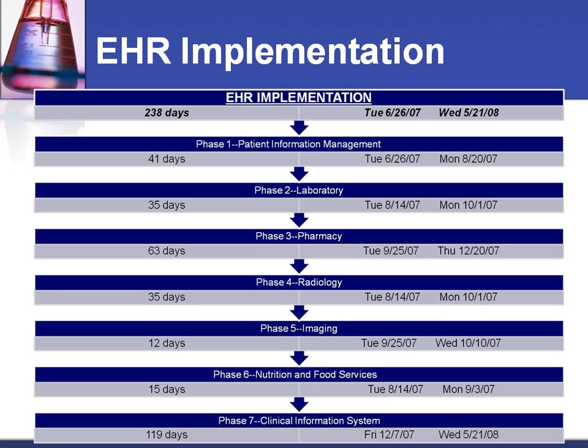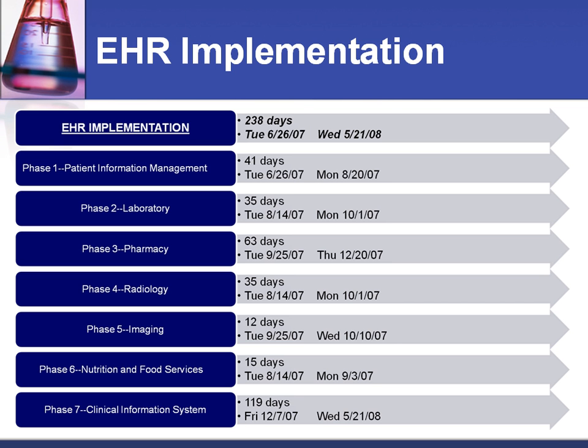While it is possible to prepare for many future phases by completing many configurations early on in the project, it is still necessary to complete certain tasks and phases systematically. This means that all phases or components of the projects cannot be concurrently installed. Based on information provided to us regarding the necessary sequential phases, we showed a total project time of 238 days.